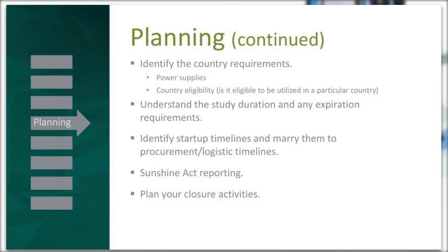And we also want to check country allowability. Is the piece of equipment or supply you're looking for CE marked for the European Union? Is it FDA cleared for the United States? Is it TGA compliant in New Zealand? Is it NHS compliant for the UK? Basically, you want to make sure that you are in compliance for whatever country safety group you happen to be in. Now, we have found that compliance is not always thought about.